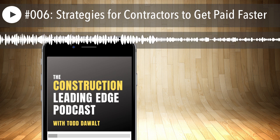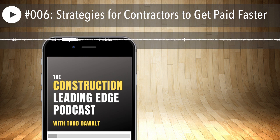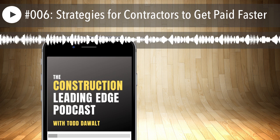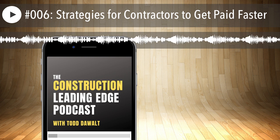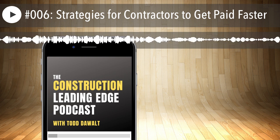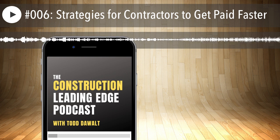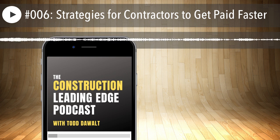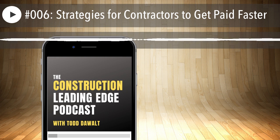So first of all, we'll talk about strategies for smaller projects that will help you get paid faster on single invoices. These would be projects that you're only going to submit one invoice for. Maybe it's a small project that takes a day, a week, a couple of weeks, but it will be covered in one invoice. So here's strategy number one for single invoice projects. This is a no-brainer, but I see it all the time. Get a signed proposal that includes a detailed scope of work and the price that you're going to do it for.